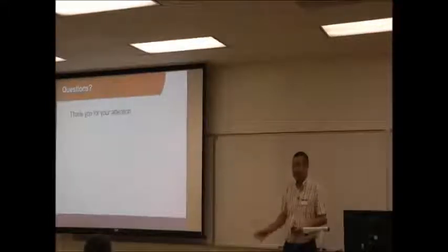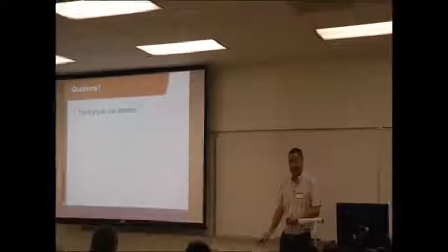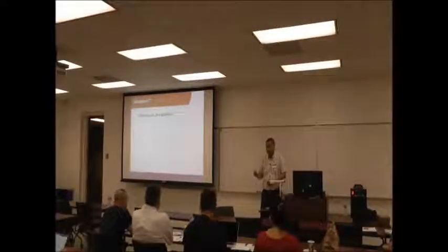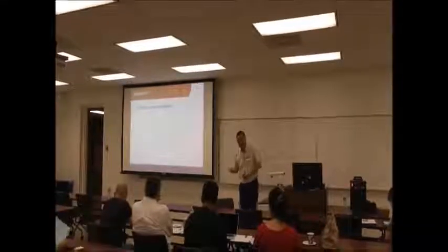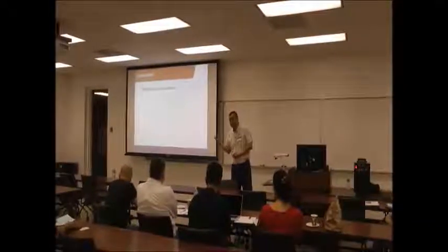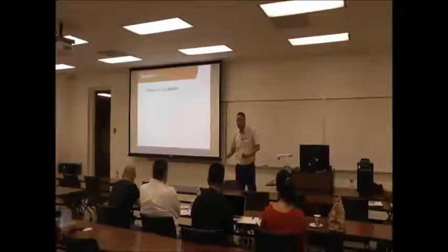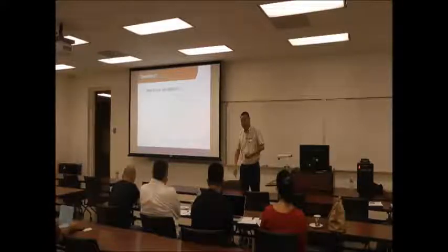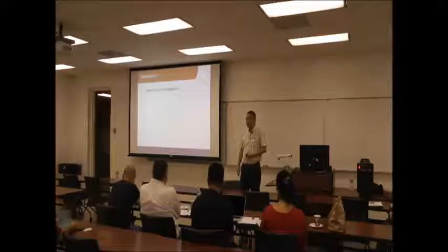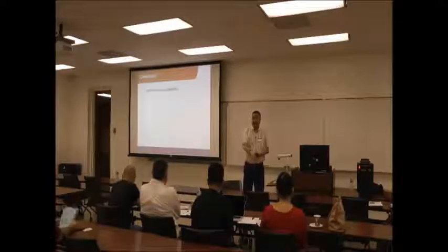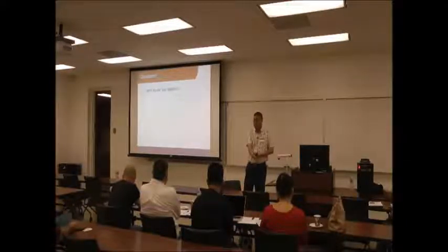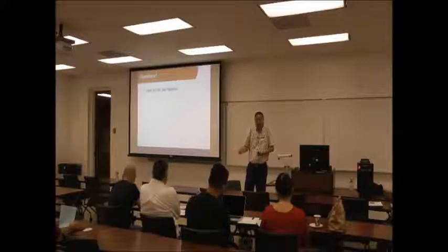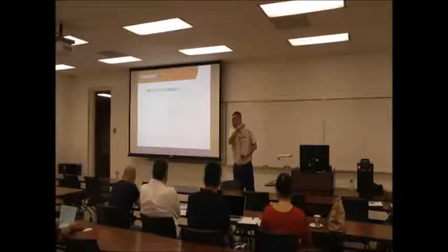And so communication is important. Okay, I think in the morning James mentioned this, and I think it's very important. If there's a problem, never drag it out. Okay, the later you fix it, the cost will be much higher. For example, if it's a cancer, early detection means you can live for a long time. If it's late, well, you know, it's going to be tough. A defect you identify early, in the same phase through review, all you need to do is fix a couple of documents, right?